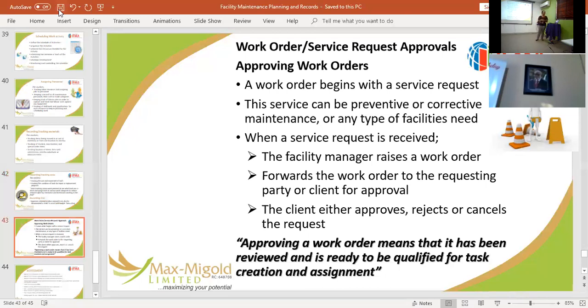Then I do the permits, job hazard analysis, and the materials. I will now go into detail with the vendor. Discuss what we need to do to make this happen. Step by step, we're always detailed. You would think that if somebody can get injured facing this door, they're going to break. You understand? And so on and so forth. So that's the practical process of how it goes.